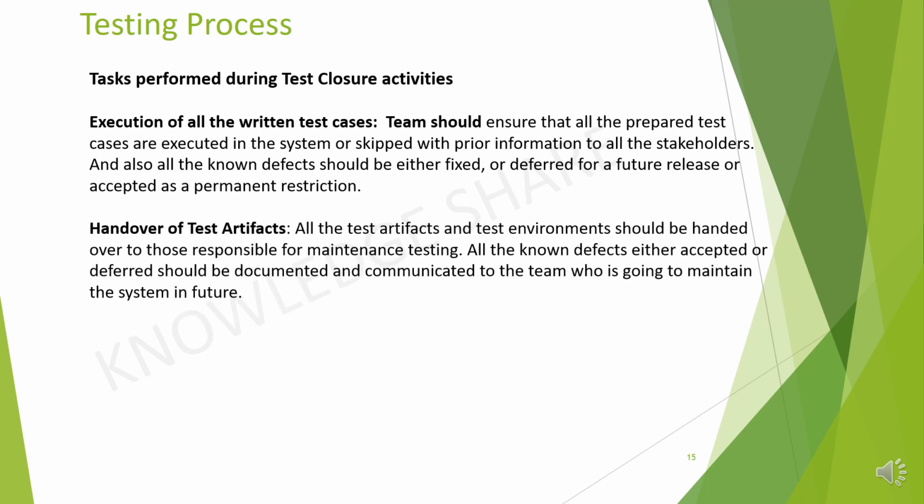2. Handover of test artifacts. All the test artifacts and test environments should be handed over to those responsible for maintenance testing. All the known defects, either accepted or deferred, should be documented and communicated to the team who is going to maintain the system in future.